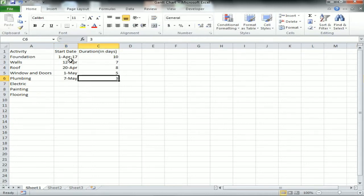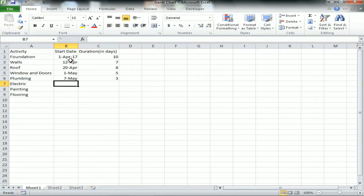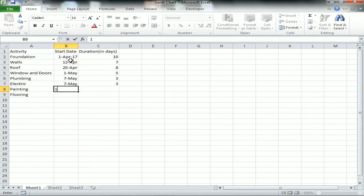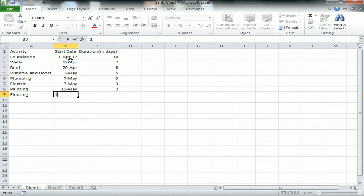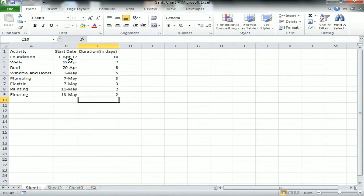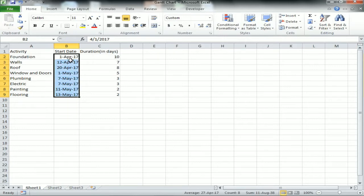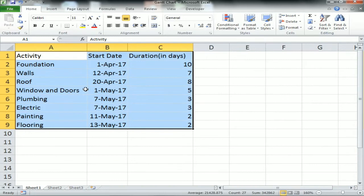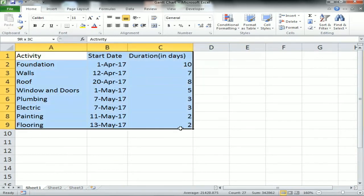Plumbing will take 3 days from seventh of May, and Electric will take the same - they will be done on the same day with the same duration. Painting will start from 11th of May and it will take 2 days. Similarly Flooring will start from 13th May, it will take 2 days again. Now let me zoom it to showcase the data.